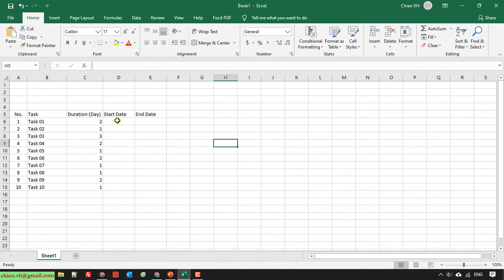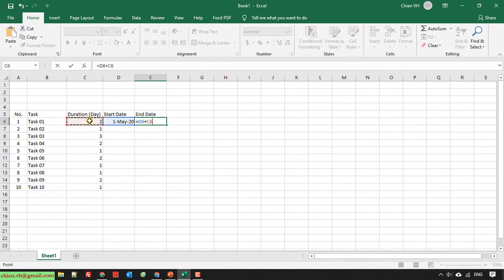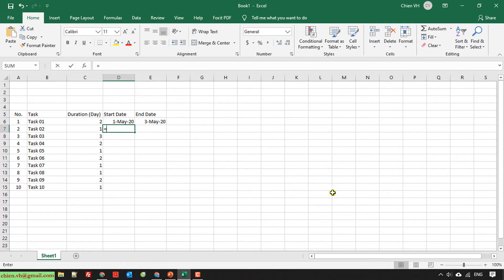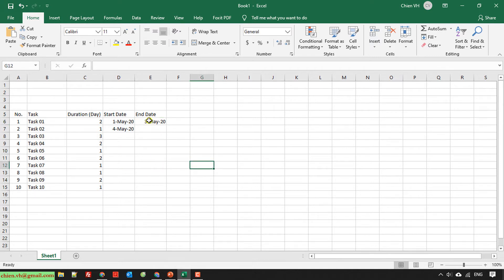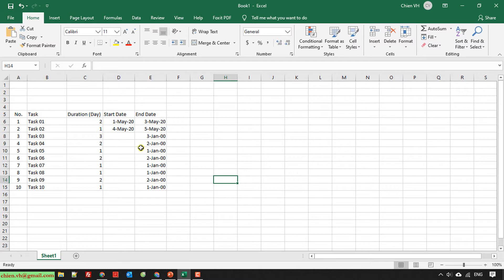My project will start from the 1st of May 2020. The end date will be equal to the start date plus the duration. I will assume that the start date of task number 2 will be equal to the end date of task 1, minus 1. I will copy the formula for the end date for all of the tasks — just click on the end date for task number 1 and drag from top to bottom. I will copy the same formula for the start date of the remaining tasks.